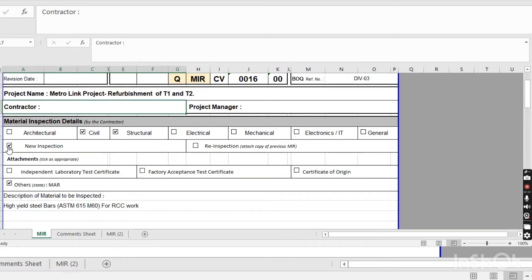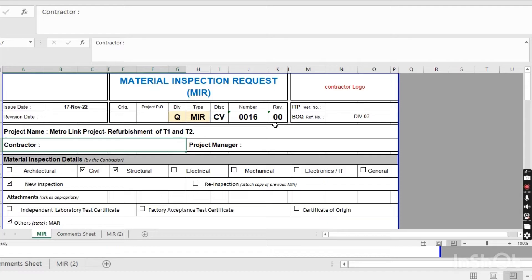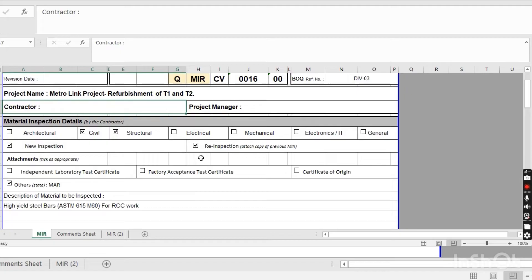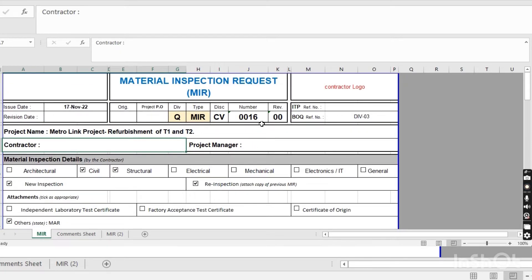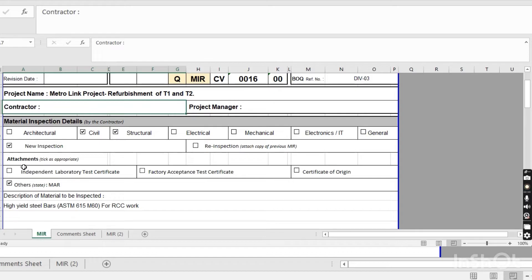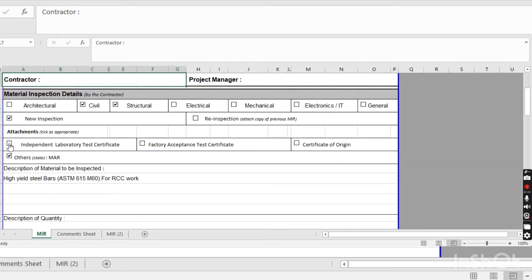If this is a new inspection, click on new inspection. If this is a revision, write the revision date for the inspection and click on re-inspection. When clicking re-inspection, you also have to attach the first inspection result to the MIR request. For the attachment type, options include: laboratory test certificate, factory acceptance test certificate, certificate of origin, other, and MAR. Here I click 'other' and write MAR, because all test certificates, packed acceptance certificates, certificate of origin, and technical data sheets are available in the MAR document.